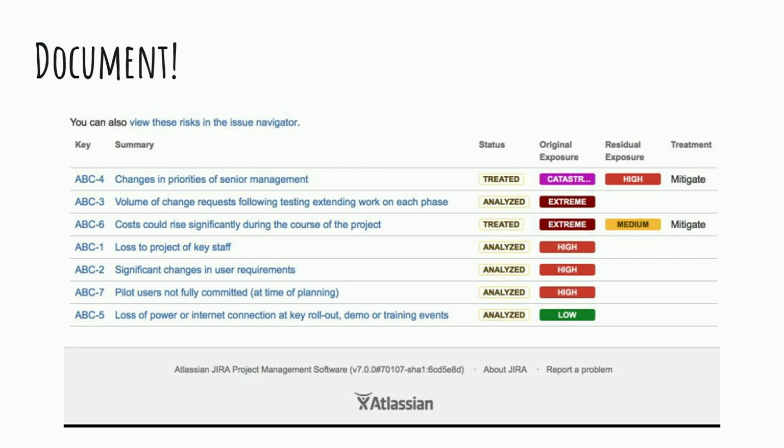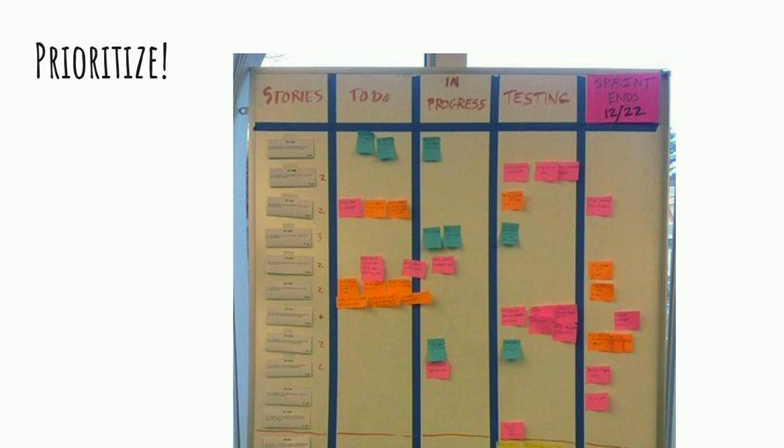You're going to document each risk with a likelihood and impact rating: low, medium, or high. Likelihood can be linked to incident history, if anything. For impact, use your incident severity rubric as a guide, and your PO will help you focus on customer capabilities. Your risks are not stories. Add tickets to your backlog that link to the risks. Get help from your PO to prioritize the work. It's important that you get alignment with your PO on how often that work should happen.